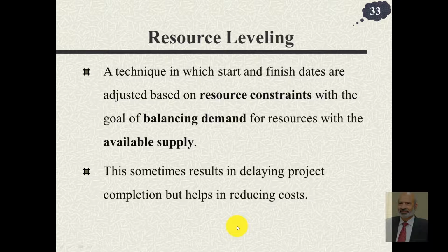So if people are made to work beyond 40 hours per week, your cost would definitely increase. Suppose you have some resources that are scheduled in that manner and you want to reduce your cost, you try to figure out how you can do that, and one method for that is resource leveling. Resource leveling is a technique in which start and finish dates are adjusted based on resource constraints with the goal of balancing demand for resources with the available supply.